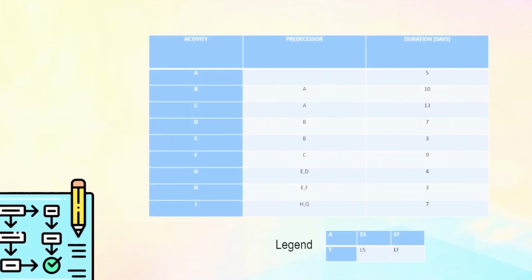How is the critical path method applied in the field of construction? Construction projects can be complex and time-consuming. CPM supports project managers in completing construction projects on schedule and within budget. Following the signing of a construction contract, project managers may utilize the CPM to successfully plan and prepare for the impending project. They may break down all the required tasks and slot them into the diagram, link their interdependencies, estimate activity durations, and identify the key route to accomplish the project.